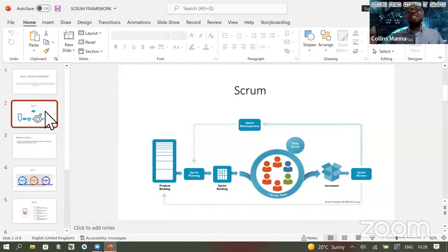Because if you tell an engineer like that, they say, yes, it's vague. Tell me, what do you want on that screen? Do you want a login screen? Do you want a password? What are the parameters within all of that? They will sit back and break it down in that sprint planning meeting, into smaller chunks. They can take one user story and break it down into smaller components called acceptance criteria. We need this, we need that, we need that. The ticket. Good. Now they are good to go.